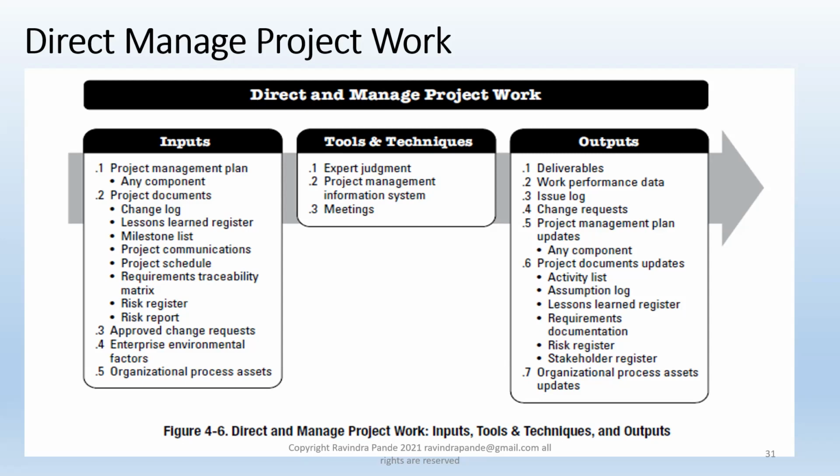Then the project schedule. We start project scheduling whenever we try to understand the expectations which are expressed implicitly by the client, by the stakeholders, where I want this solution to be developed before Christmas. So Christmas, as we know, is on 25th December. So we need to make sure we cover all those creation, enhancement, quality control, quality assurance type of activities before 24th of December. Because on 24th of December, we will deliver this product to the client, right? And so on and so forth. So we need to plan proactively. So we start building this schedule.